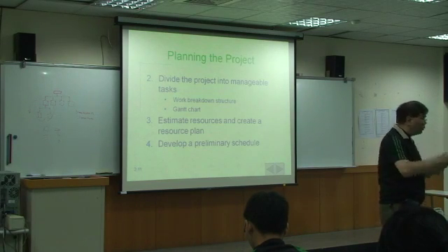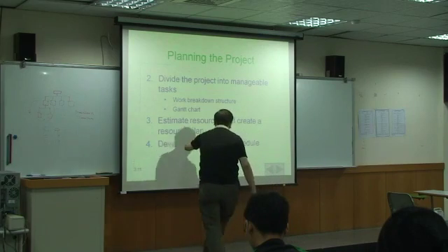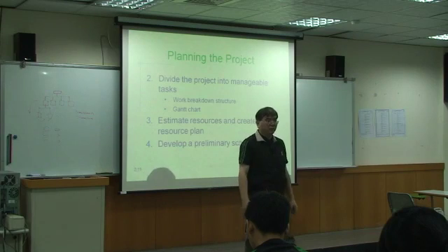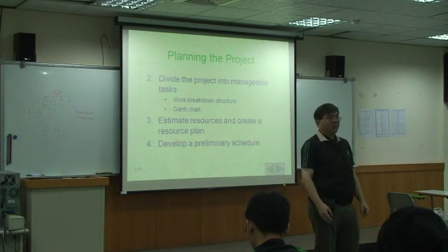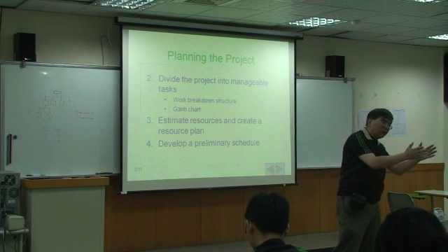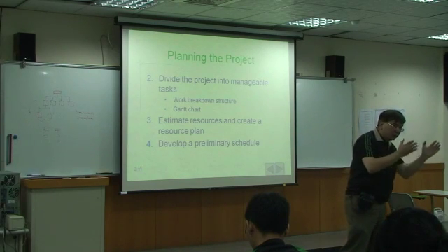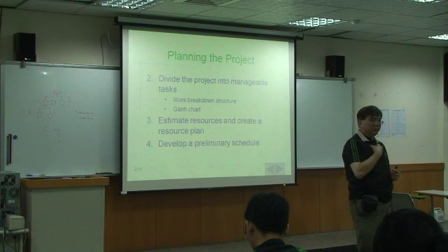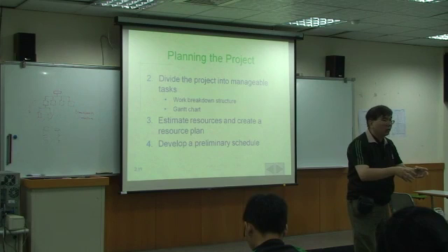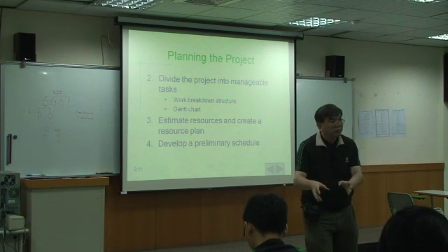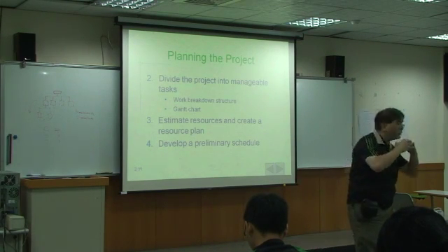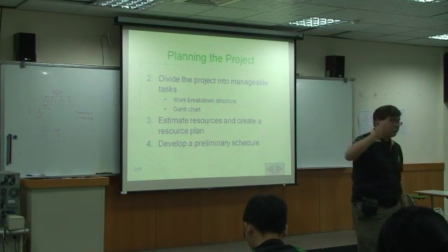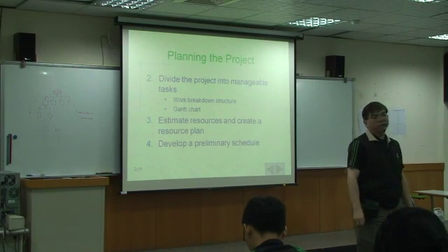So why do we need a preliminary schedule? Why do we do the sub-TBS? This means we take some time period to check it. If it's okay, then you pay me the money, then I will do the next step. Then you keep the balance. So why do we need to break our schedule into sub-schedules? That's the reason why.